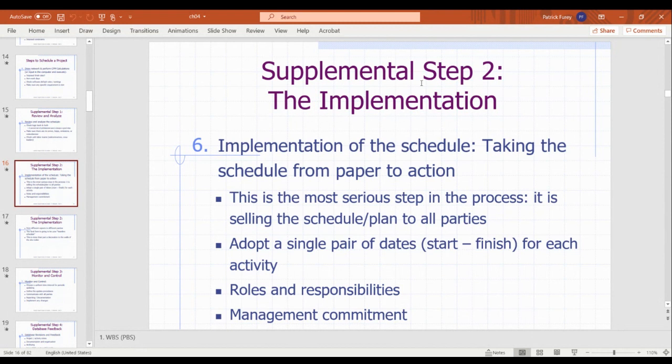And you're going to have some logic related remedies where you're going to speed things up or make up for lost time by doing XYZ, by working 10-hour days instead of 8-hour days, whatever that is. That's where the control portion of a schedule comes in. But it has to be clear. It has to be, like I said, qualitative, quantitative. It's got to be completely locked in terms of communicating and incorporating that.